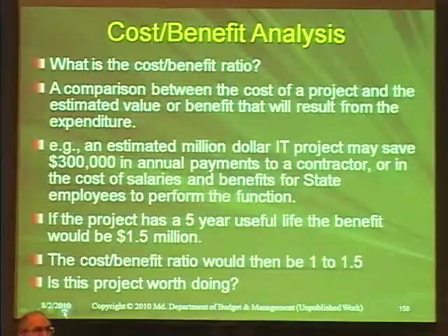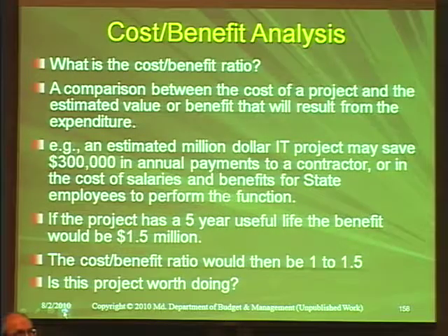So this is a comparison between the cost of a project and the estimated value or benefit that will result from the expenditure, the benefit for the cost. And the example we've put up here is, let's say that we estimate that an IT project, an information technology project, is going to save $300,000 a year in payments to a contractor or in the cost of salaries and benefits for state employees, anything that would go from a cost standpoint. So $1 million expenditure,